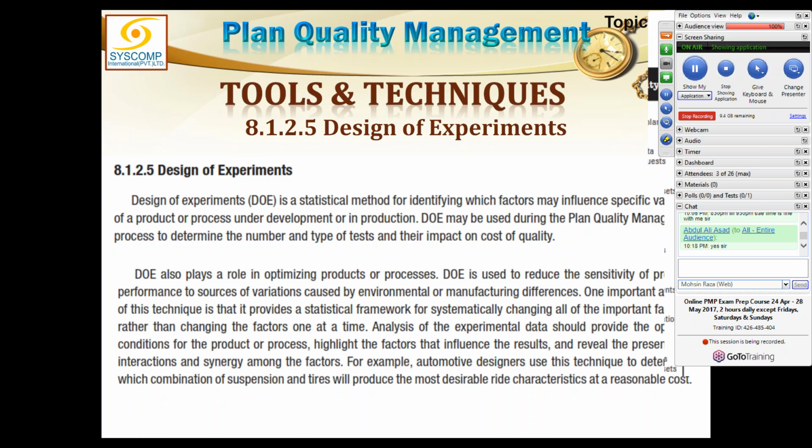We will say, okay, we will use this combination of a round container at 25 degrees for this much time with this dough. This is the result, and then you can make a number of experiments, and make cake with every one of those methods, and then you show this cake to people and ask them which is the better one. The one which gets voted the best is the method which becomes the ultimate recipe for that thing. This is called the design of experiments.